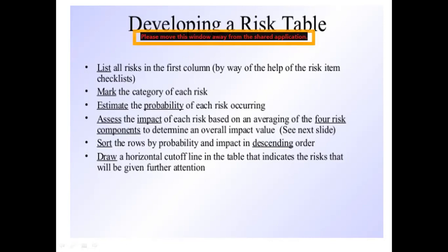Another step is to sort the rows by probability and impact in descending order. With the help of the table, we will sort the rows by probability and impact.